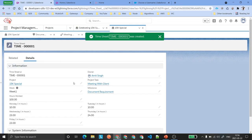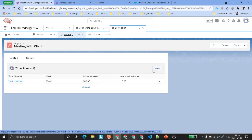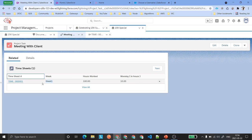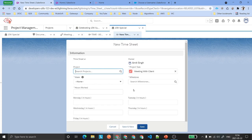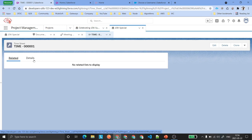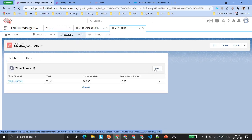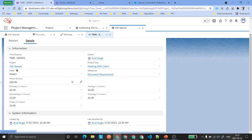So this is all the information about the timesheets. But this New button should not be used for creating a timesheet normally. Once you have a timesheet for Week 1 and you try to create a new one, you will get an error saying you cannot create timesheets for the same week. The same user cannot create a timesheet twice for the same week.